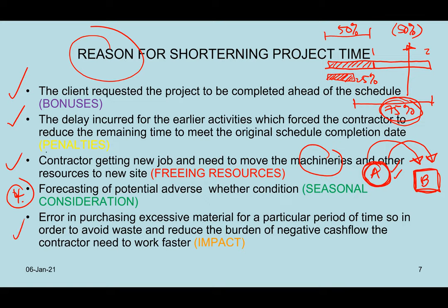And lastly, error in purchasing. You know what? You can purchase material and then bring material to the construction site. Nowadays, the client allows some money to be paid based on material on site. Previously, based on the contract, not much that you can claim unless you already put the material into construction. Okay, you use up the material based on the real work.